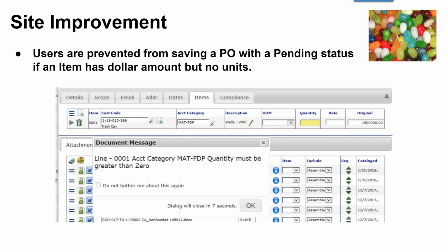that the back end logic can check and see that there's a line. You can notice that the line has the MAT. That's how we can even know that this is a material line. If so, a contract that involved both, theoretically, if they ever did this, I don't think they mix this way, but if there was ever both a material and the labor line on the same subcontract, it would know only to pay attention to quantities being required on the things that are actually materials.